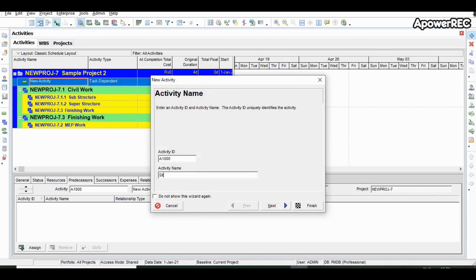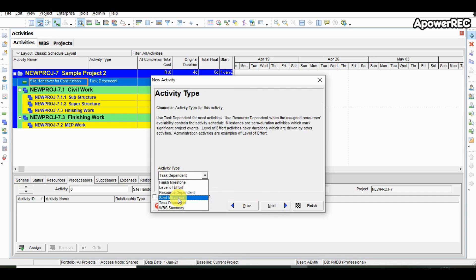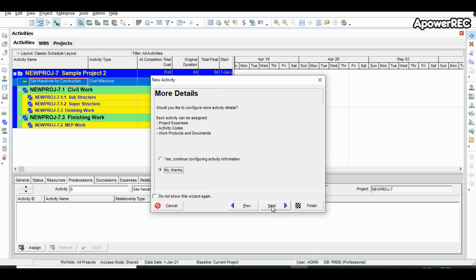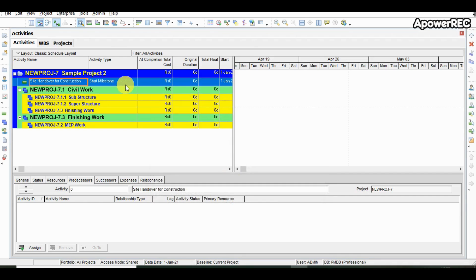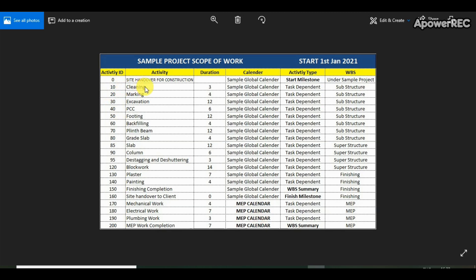We need to provide the activity name. For simplicity we will put the activity code as 0. The WBS has already been taken. The activity type is a start milestone, so we have chosen start milestone. Other details we will not define for now and will take them further in coming sessions. We have defined the very basic details about the activity: site handover for construction.